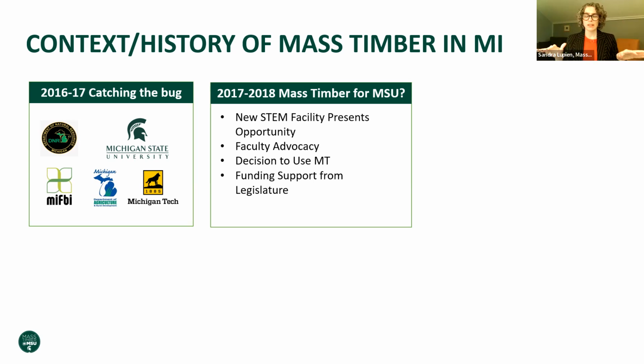And after doing that analysis, they realized that it would only cost 2% more to do a mass timber and steel hybrid structure for this particular building. And that the perceived return on investment, that is to say, a lot of intangible things, right? The ability to get great publicity about the building, to establish some leadership, to create a landmark, but also to create a building that's extremely beautiful and appealing for students. All of those reasons made them decide, yeah, we're going to go with mass timber.